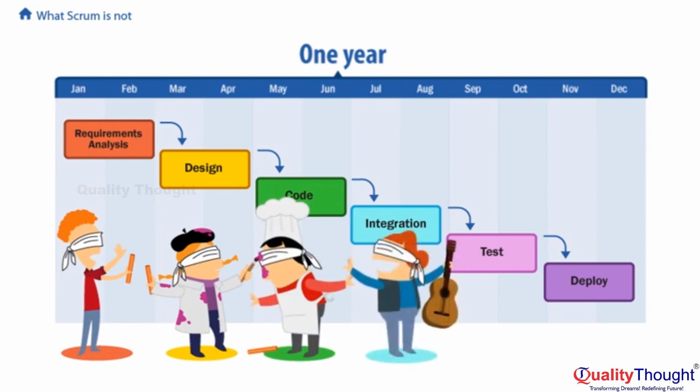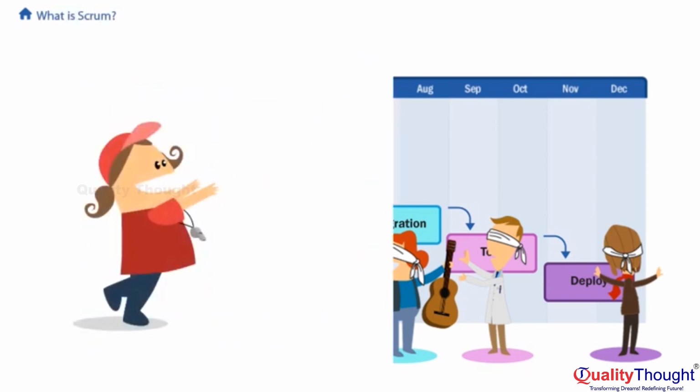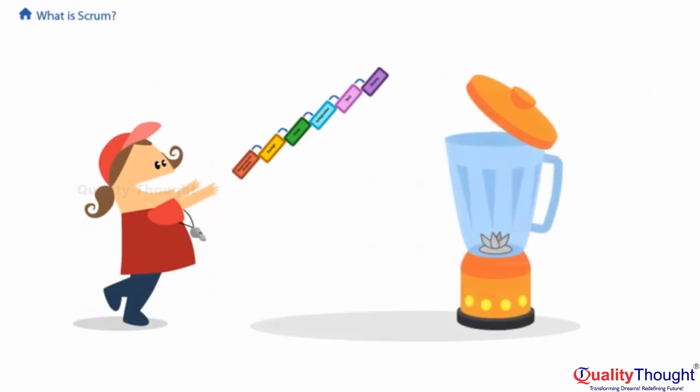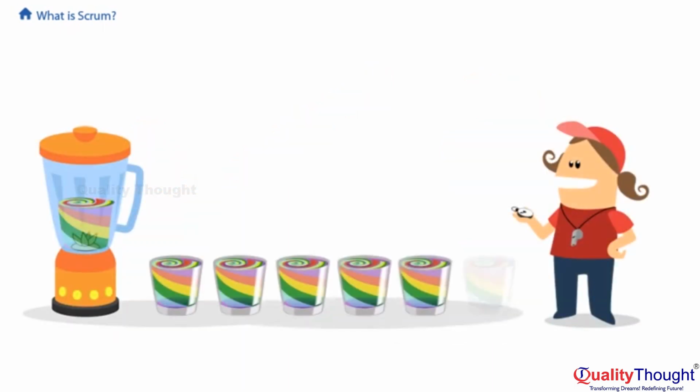But a plan-driven approach requires us to make our most important decisions right at the beginning when we know the least. Waterfall projects eventually descend into anarchy when the actual work finally happens, with low quality and too much overtime. Scrum throws all those phases in the blender. All the ingredients are mixed into every sprint. Instead of dividing the work into activity-specific phases, we divide it into fixed-length iterations called sprints. Every sprint contains some combination of analysis, design, actual implementation, testing, learning about customer needs, and planning for the future. Maybe we'll actually be deploying or shipping more frequently.